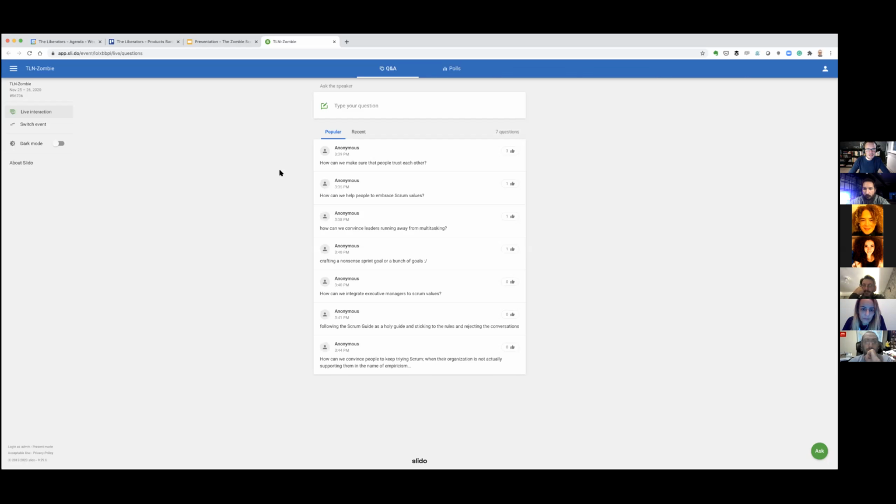And then probably what you'll see is that Scrum is not really working out for those types of teams. It's just causing them stress. So my recommendation would be to make this transparent. Like, we don't really have a product backlog. As a consequence, we can't set a sprint goal. And as a consequence of that, we can't define a product goal. So I think for these teams, it's highly difficult to be successful. And my recommendation would be to push the brake and to go back to the drawing board and to rethink what type of team you want to be. If you do nothing, I'm sure you end up with zombie Scrum. And it can be interesting, but I don't think you want to move in that direction.